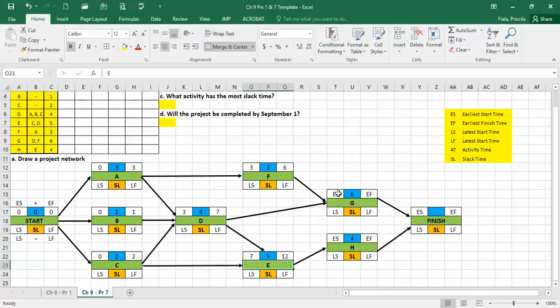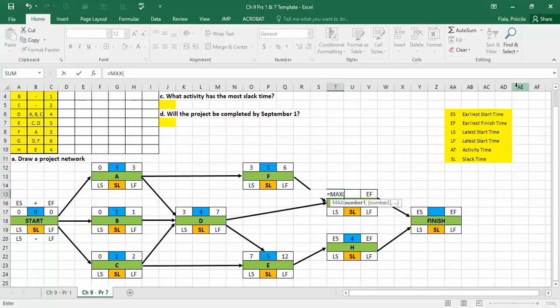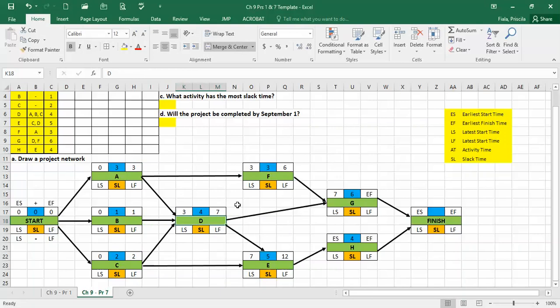Another way you could do it, just going to show you a little formula, but you would have to be very comfortable with Excel and with these predecessors. It's not difficult, you just need to really know which ones are the predecessors. You could just say you want to know the maximum number between this cell and this cell, then close parentheses and enter. It's going to tell you the maximum number is 7. It's like you picking the highest. Over here, you could do the same thing with the maximum of this cell, comma, this cell, comma, this cell, and you close, and it should tell you it's 3. There it is. The problem with this is, if you click on the wrong cell or you forget a predecessor, everything else goes bad. Okay, so there's the formula for you, but I'm going to keep going the way I was.